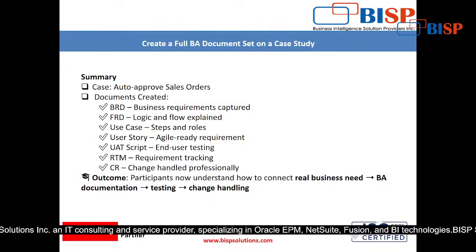Now this change handling will also take 2 to 3 weeks. The reason is that the client has asked for the change, so 1 week will be required, and 3-4 days will be required to make the changes, whatever the new changes are demanded. Minimum 3 to 4 days, right? And then